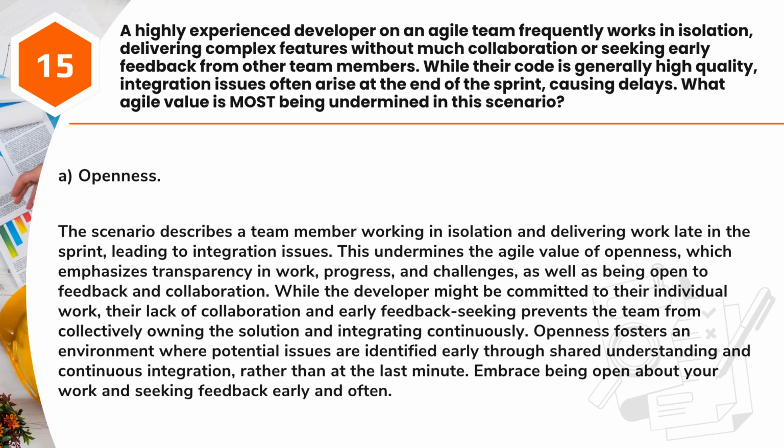Answer: A. Openness. The scenario describes a team member working in isolation and delivering work late in the sprint, leading to integration issues. This undermines the Agile value of openness, which emphasizes transparency in work, progress, and challenges, as well as being open to feedback and collaboration. While the developer might be committed to their individual work, their lack of collaboration and early feedback seeking prevents the team from collectively owning the solution and integrating continuously.